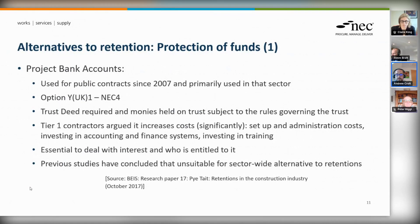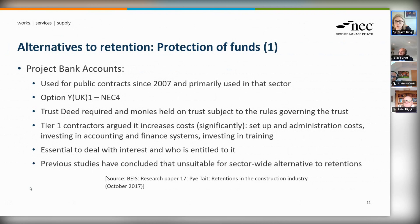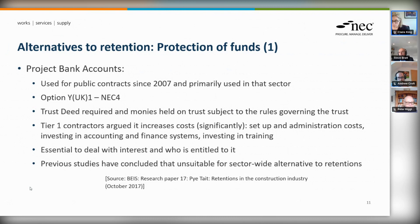The alternatives are broadly divided into two categories. The first is protecting the funds handed over as retention — different ways of doing that so there's not a risk to them if there's an insolvency upstream or anywhere in the chain. The second category is security for performance — alternative ways of getting cash if the contractor has decided they're not going to come back to site to deal with the defects or they're out of the picture for some reason.